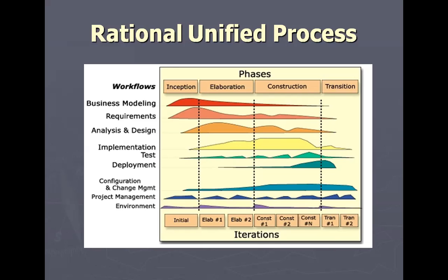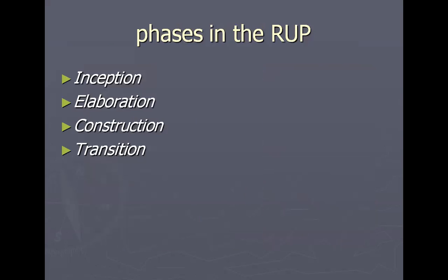After that, we will learn the working of each phase in depth. Inception phase. The work that you will do in the inception phase is: you have to define the project scope, estimate the cost and schedule, define the risks, develop the business case, prepare the project environment, and identify the architecture. These are all the activities you have to do in the inception phase.